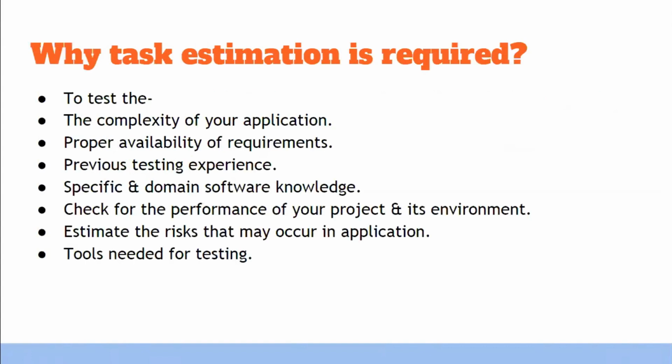Now the next question here is why task estimation is required, why it's important. It's needed to test the complexity of your application. If your application is very complex, then the time it will take will be very high, and the cost can be high also, and it will take a large number of people. That is, the resource requirement will be high. Then, proper availability of resources: do you have a suitable number of human resources, and suitable tools?